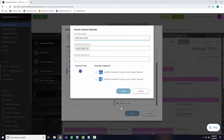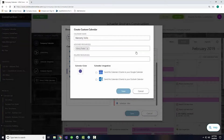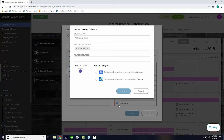Keeping all of this information available on the calendar is a great way to get information synced up. For those working with Google Calendars or Outlook calendars, there's an easy way to link this information directly. All you have to do is check the box and, if you have it linked, it'll create the calendar with the same information and update those activities as you work. This lets you share information with customers, subs, or team members who aren't actively in Construction Online, simply by linking these calendars.